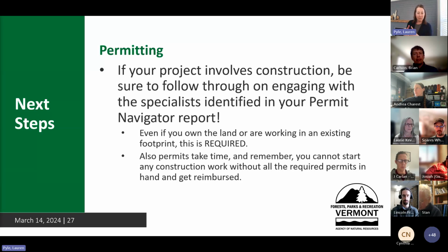So you need to follow up with DEC, because they might say, actually, yes, you do need to do that, or you need to do this kind of survey or something like that. And so this is work you can be doing now, that initial investigating of, do we need it? Do we not need it? If you already know you need it and you've got it budgeted, we're going to do the wetland survey, it's happening, wait till your grant agreement is signed to actually do the wetland survey. So this is the phase of, do we need it? Do we not need it?